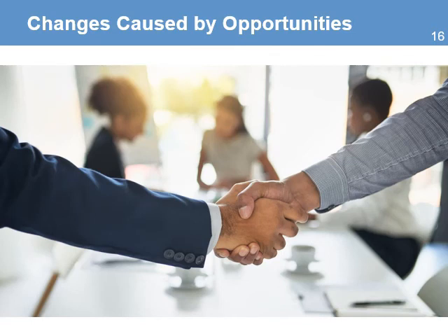Opportunities are the events or conditions that can have a positive impact on the project's objectives. They are harder to predict than risks, but they are usually discovered as the team searches for solutions to common problems. For example, there's an opportunity to join forces with a local nonprofit to reduce the cost of collecting data. If this opportunity is taken, the project can save resources and that can be used in other areas. The change will affect the budget and the team responsibilities. As a project manager, you need to evaluate each opportunity for its probability and impact on the project.